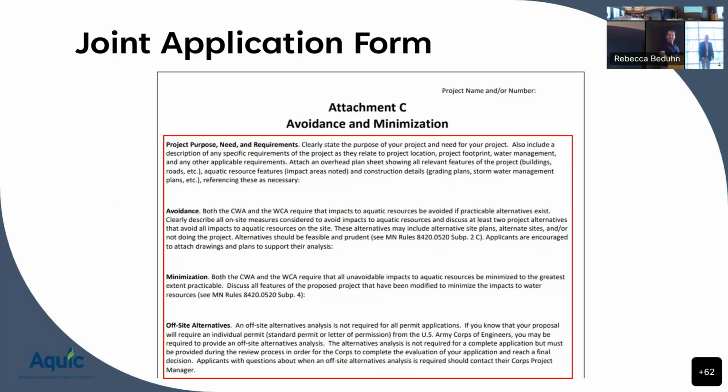And just a couple of general points about the replacement plan application. I think we're all familiar with the cover page telling us what parts are required: Parts 1 through 5 and Attachments C and D. But another thing that is really important, stated on the joint application itself, is that pre-application consultations are strongly encouraged. That should be bold, italics, underlined, basically always done, in my opinion, especially for relatively large replacements, or really projects of any size that are going that way.